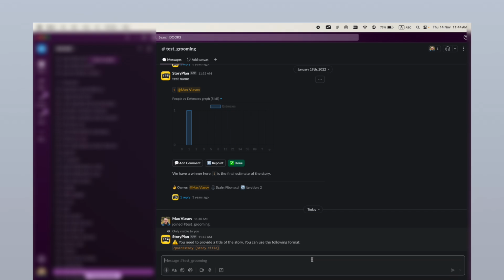And who should actually take part in this estimation? Each team member who is working on a task. In our case, for example, it's a software development case, and we need to estimate a task from the perspective of delivering it to the definition of done. So in this process, we know that developers will take part, and quality assurance guys. So all these people should put story points for each user story.